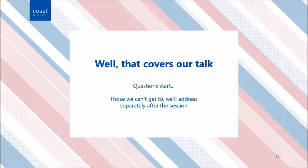There will be some clients for whom that will be really appropriate. There will be some clients for whom a waterfall approach, and literally a waterfall is we do an activity that ends, that leads onto another activity, that ends, leads onto another activity. So a research to a workshop to design to build in a waterfall fashion. There will be those clients for whom that is the right approach and it's best for them.